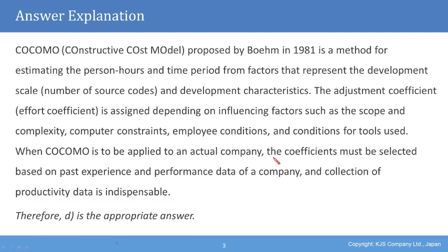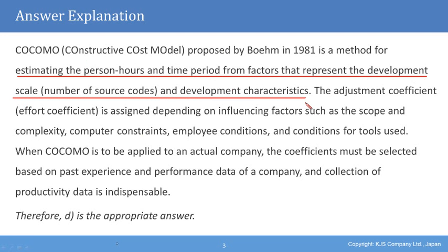First of all, we'll talk about what is COCOMO. Constructive Cost Model, or COCOMO, is a method proposed by Boehm in 1981 for estimating the person hours and time period from other factors that represent the development scale and development characteristics. The adjustment coefficient, or effort coefficient, is assigned depending on influencing factors such as the scope and complexity, computer constraints, employee conditions, and conditions for tools used.